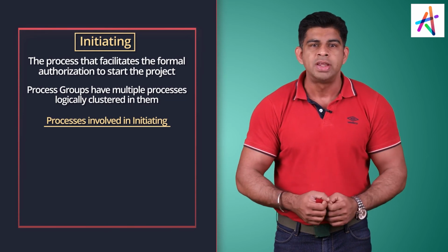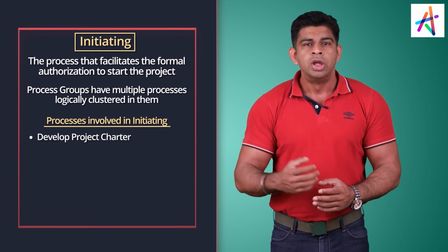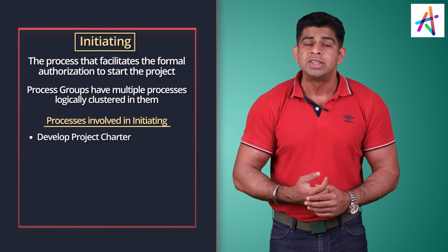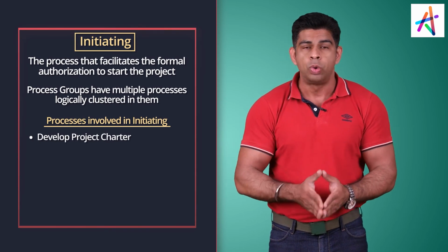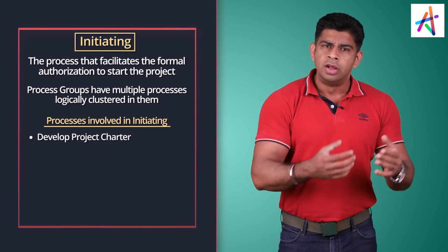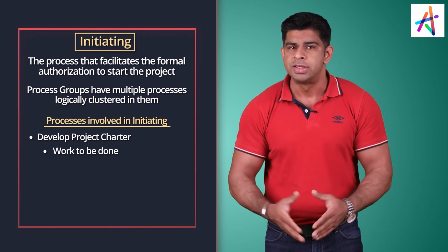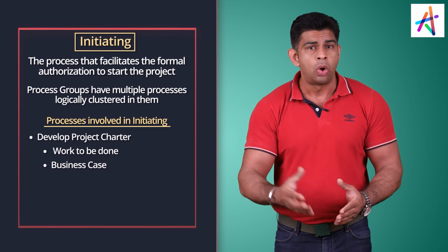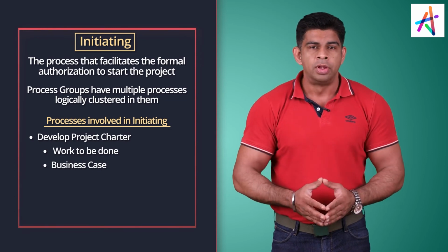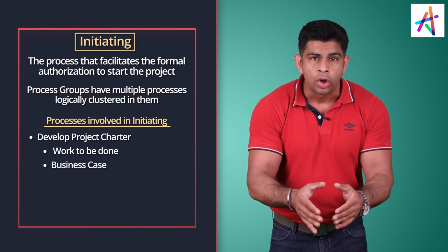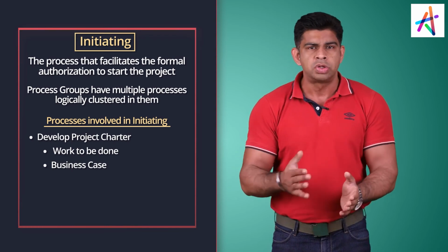The first one is develop the project charter, to initiate and authorize the project's existence, which will contain at a high level the work which has to be done and the business case. It will also contain your name, your authorization, your authority, and a few other details which we'll talk about when we are doing the course.